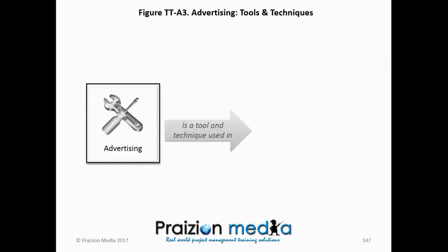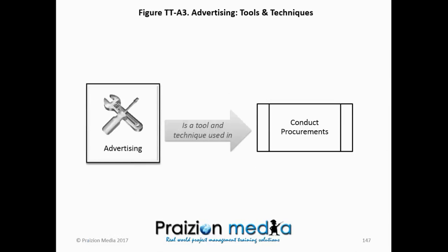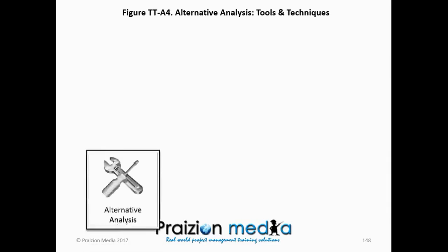The next tool and technique is advertising. It's used to advertise RFPs, RFQs, RFIs, or the procurement process being conducted. It's carried out in conduct procurements, and it's used to make sellers aware of the procurement at hand.